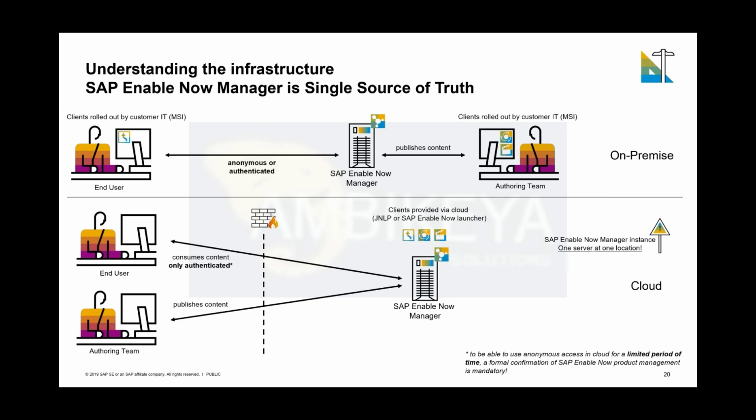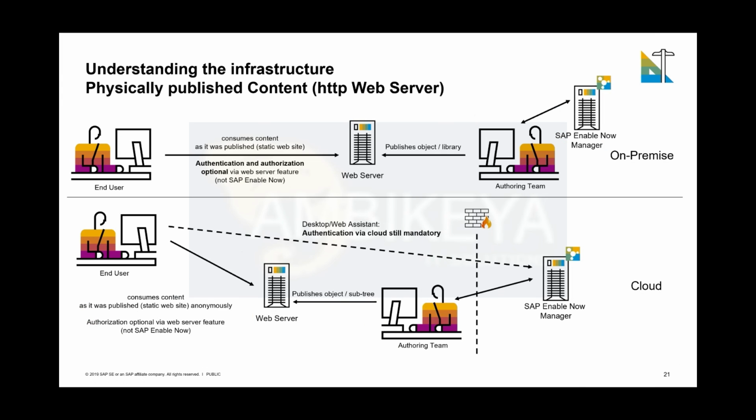Network topology options, again, comparing the on-premise world against the cloud world, seeing the limitations of each, focusing on the fact that there is a firewall in between that needs to be aware of us, that there is some criticality here that is to be discussed and tackled early enough in the project to at least be able to access the application properly from the very beginning. So making the customer team aware of what they need to do.